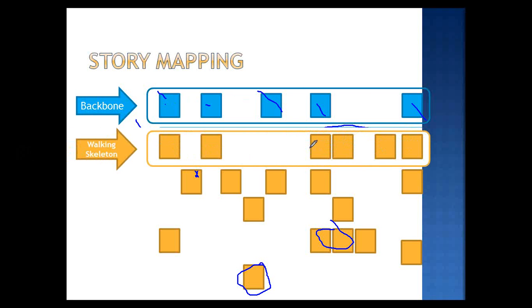The ones that you put on the very top are what we call the walking skeleton. And walking skeleton is basically the bare minimum that you can get to walk. In the lean startup movement, they call this walking skeleton the MVP. Okay, so I tend to use that terminology, MVP, because this is the minimally viable product, right? What's the bare minimum that we could create and deliver to our customers so that they could actually see and use the system, right? It's possible that this might include one of these. That's okay, right? You just include it like that, and this is the MVP then.